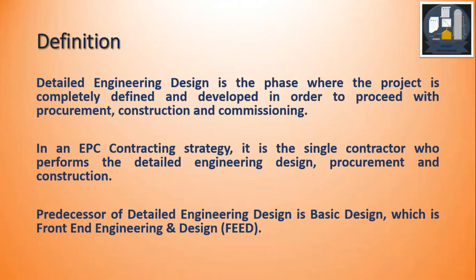To start with the definitions: detailed engineering design is the phase where the project is completely defined and developed in order to proceed with procurement, construction, and commissioning. In an EPC contracting strategy, it is the single contractor who performs the detailed engineering design, procurement, and construction. The predecessor of detailed engineering design is basic design, also commonly called Front End Engineering and Design — that is FEED.